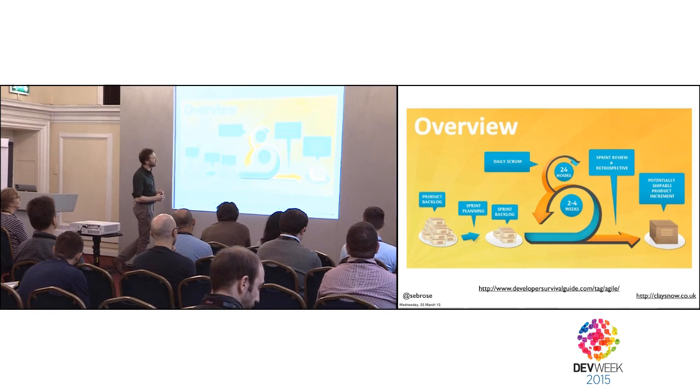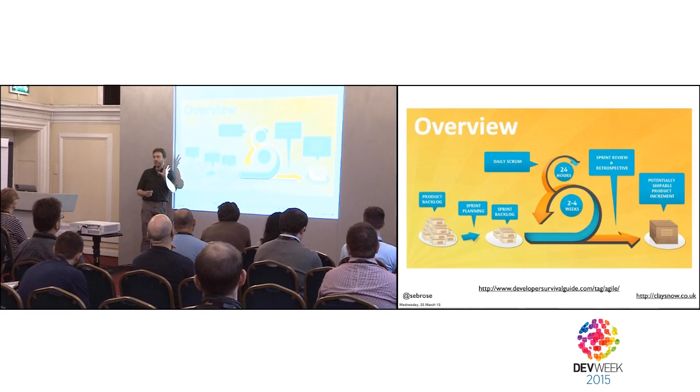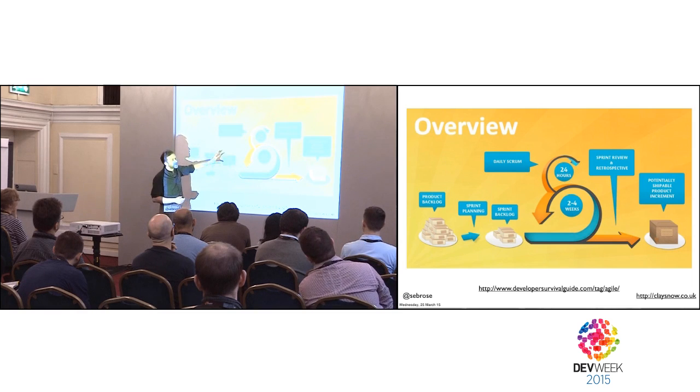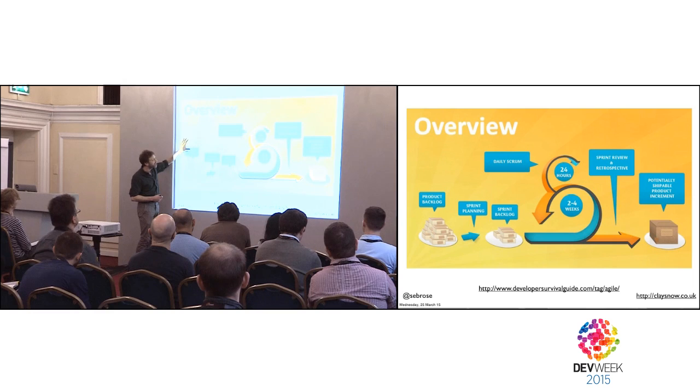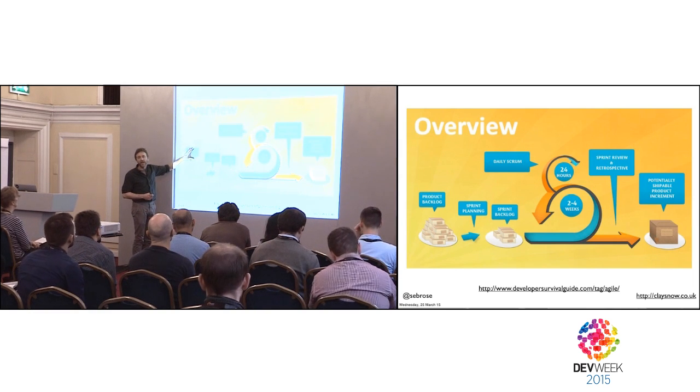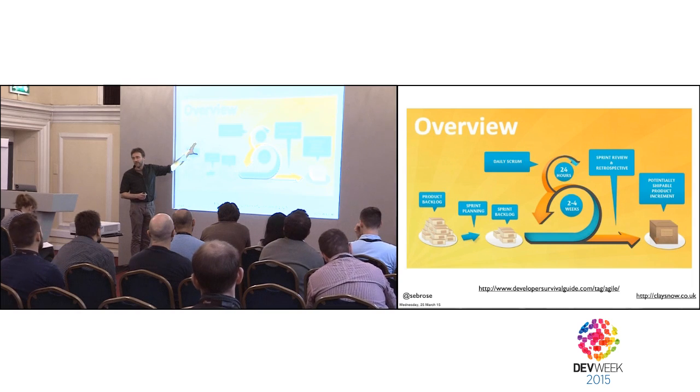The place that people typically put that Three Amigos workshop is instead of the Backlog Grooming. Now, Backlog Grooming is around here. It's probably this one, but there's nothing specific in Scrum about grooming. But most Scrum implementations that I've ever seen have got one or more grooming meetings in the sprint before something gets accepted onto the backlog.